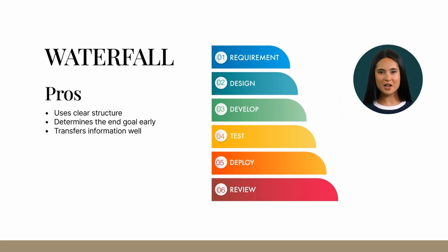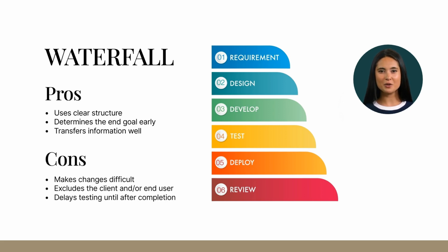Now let's look at some of the cons of the waterfall methodology. Makes changes difficult. The waterfall model's structured approach, while advantageous for maintaining progress, also becomes a drawback. Its rigid adherence to predefined steps leaves little room for unexpected changes or revisions. If a team diligently follows the waterfall steps and encounters an unplanned obstacle near project completion, making necessary changes becomes challenging. The extensive work completed under specific assumptions could become redundant with a sudden shift in project parameters, disrupting the entire timeline.